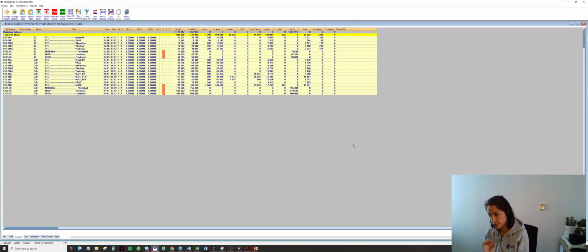Now, you still have to remember that we've been entering everything that is part of the cost tab environment. However, the travel plan, if you remember, we have to click on an external window to enter it. The Exhibit A are also external notes to this cost tab. And I think that's it. So those still remain to be entered manually.